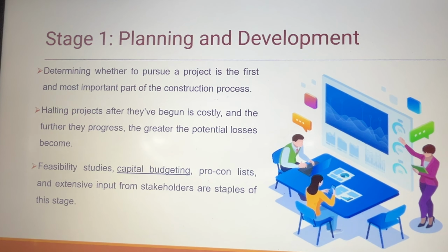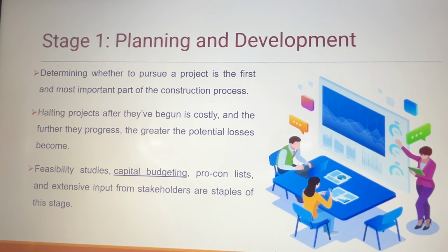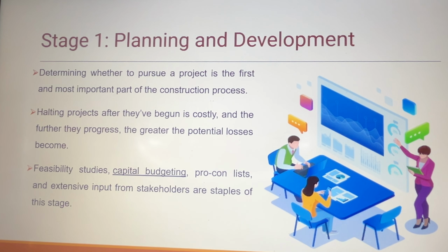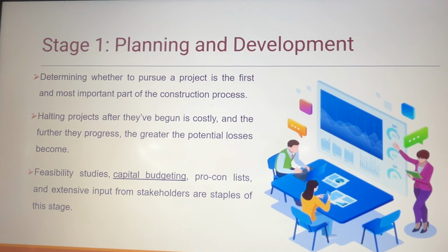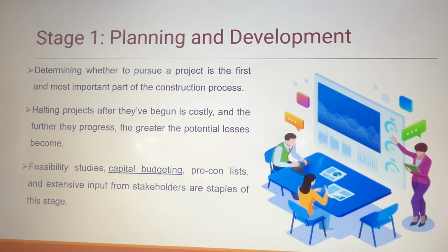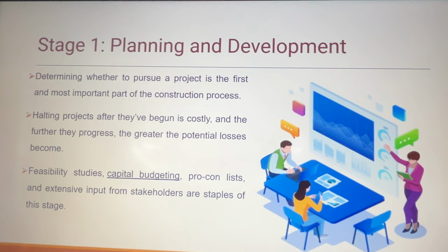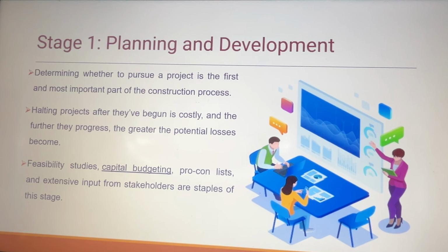First stage is the planning and development stage. Here you have to determine whether to pursue the project or not, and it is the most important factor for the construction process. Halting projects once they begin is costly, and the further they progress, the greater the potential losses become. Feasibility studies, capital budgeting, pro-con lists, and extensive input from stakeholders are some of the staples of this stage.